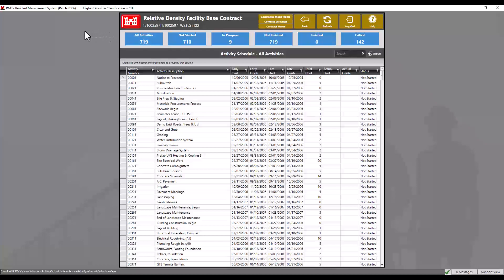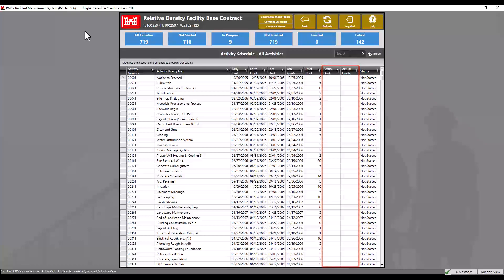Most schedule types are imported via the SDEF file. For instructions on importing an SDEF file, please see the link in the description box below. Actual start and finish dates entered in the scheduling software should match what was entered in the QC daily reports. If they do not match, the request for import can be rejected.